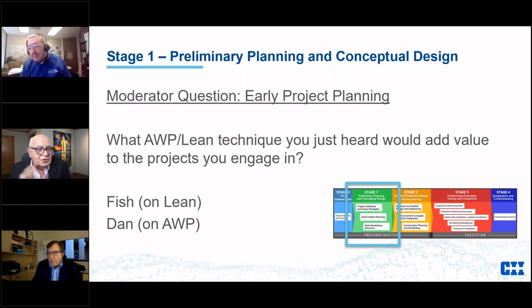Exactly. So you're using the word cluster group. In target value delivery, we identify the clusters and structure. I mentioned some of them. Structure may be a cluster, skin may be a cluster, HVAC, power. Each of these groups will be maybe six or eight people. Not six is better. But six or eight people, and it includes three or four subject matter experts, someone to lead the group who's also on the core team, which is kind of how the thing is organized.